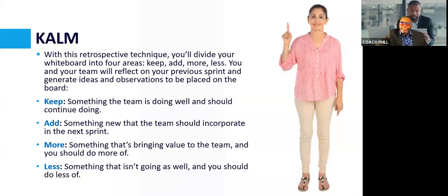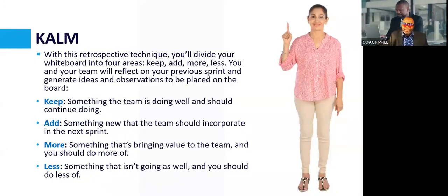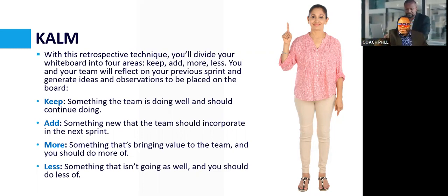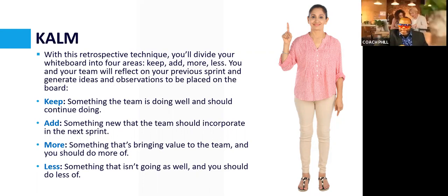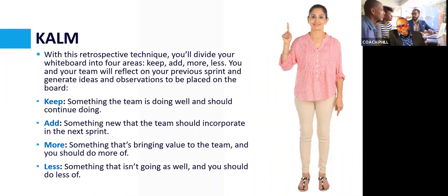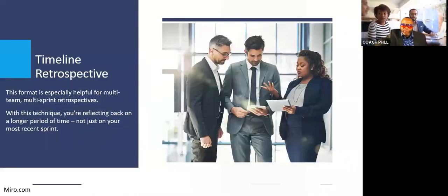They also have a page where we talk about the KALM game. Keep, add, more, less. Make it fun, glean this data. Something the team is doing well, you want to keep. Something new that the team should incorporate in the sprint, you want to add. Something that's bringing value to the team and you should do more of, that's more. And something that isn't going well and you should do less of, that's less. A great facilitator knows how to blend all of these in. We'll talk about a few more.